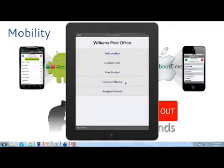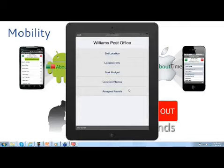Photos are another powerful feature. There's no need for an SD card or a separate device — the foreman just stamps the photo, it gets date and time stamped, they can add a description and notes, it feeds back to About Time, becomes part of the reporting system, and gives an accurate history of everything that happened on that job site. We can also track equipment time after the fact — pulling the equipment over, assigning it to a job or device or foreman or employee, then putting in units, meter readings, time of usage, logging a cost code against it, and adding applicable notes. That also feeds over to HDPCM.